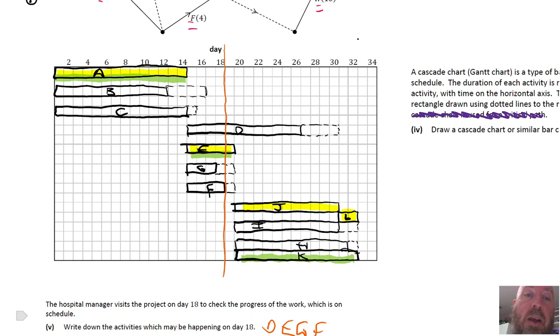So if for some reason you didn't want D, E, F, and G all on at the same time, you could move stuff around. Or if maybe you said, well, D is a big thing, so we're going to get E, G, and F finished as much as possible and then do D, you can have E, G, and F on before that line and move D to after. So there's things you can do with Gantt charts that you can't do as easily with these early time, late time things, even if I prefer the early time, late time things, because my drawing is less than good.